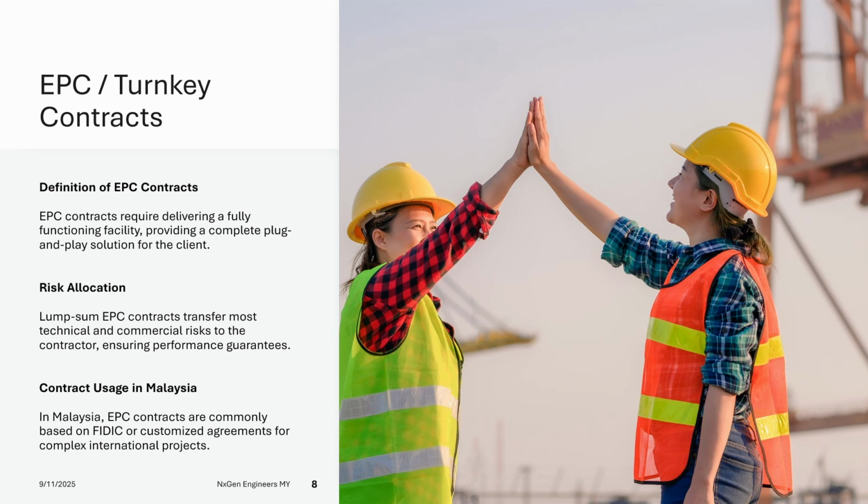Lump sum EPC contracts shift most technical and commercial risks to the contractor, making them suitable for projects requiring high certainty and performance guarantees. In Malaysia, EPC contracts are often based on FIDIC type forms or bespoke agreements tailored to specific project needs. These contracts are ideal for complex engineering projects involving international contractors. For more information, FIDIC.org and Global Practice Guides offer comprehensive resources.